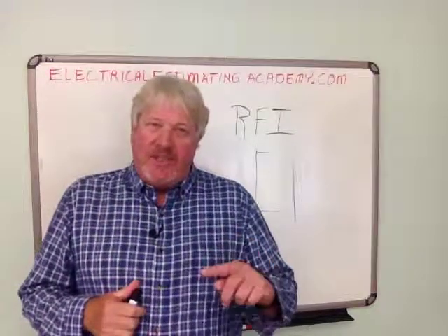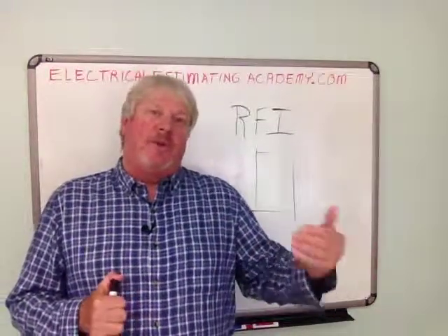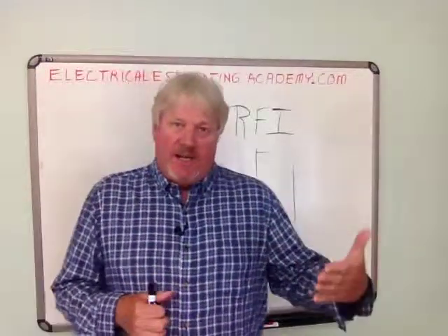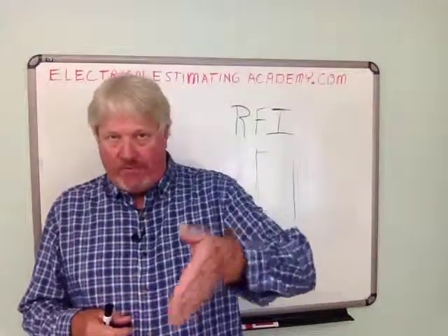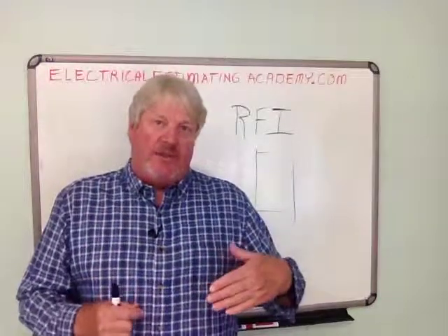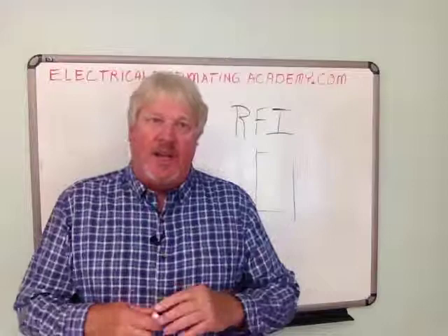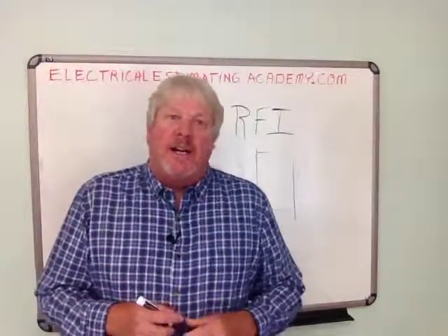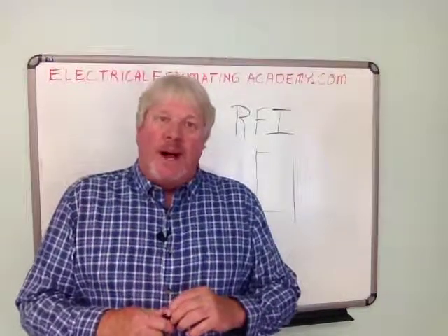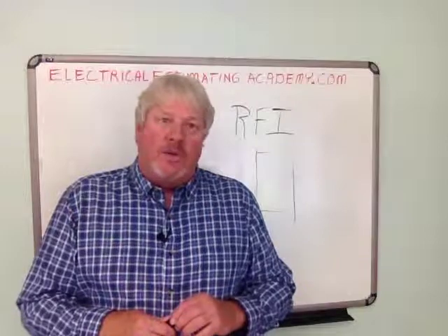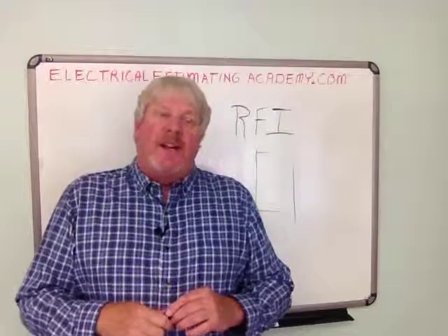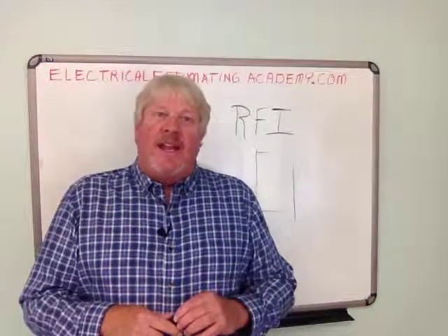One of the benefits of doing this is that everybody else bidding that project will also be submitting requests for information. When they receive those, they document them and send responses to all the bidders. So you'll get answers to the questions that you have on the project, and also to the questions that other contractors ask. Creating an RFI is a good tool for you. Also, you would save this document either electronically or on paper and create an RFI log. You'd keep a record of the RFIs and of the responses, and find out what the answers are so you can document that and keep plowing ahead.